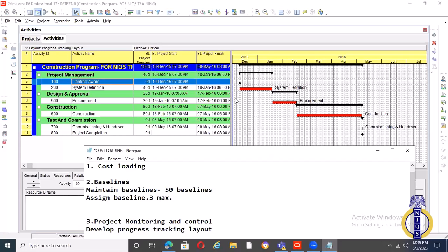That said, so you identify, but how do I get this done so that I don't fight fire? I don't know if I mentioned something when we're developing the schedule. I talked about how we determine our critical path. So first of all, from the get-go, you need to decide how many days, how many activities should be on the critical path. Your critical path usually is activities that have zero float. That is what P6 defines. That is the definition of P6.